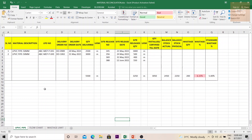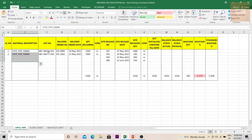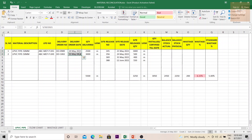For each material you can prepare different tabs and make this format. The first column is your serial number, then the material description, then the LPO number based on which the delivery is being made, then the delivery order number, the delivery date, the quantity being delivered, and the unit of measurement — whether it is in numbers, meters, and so on.